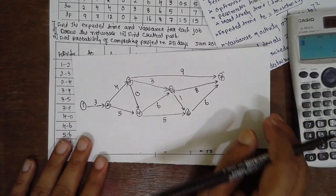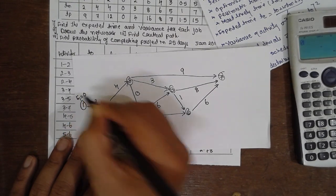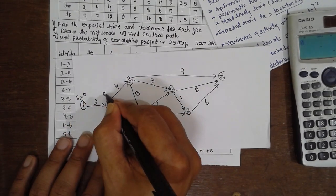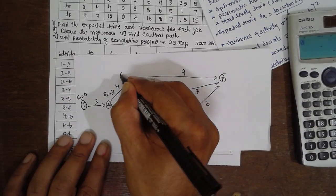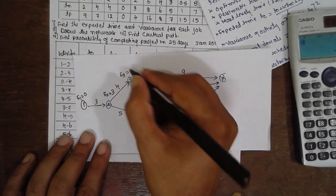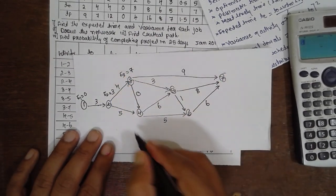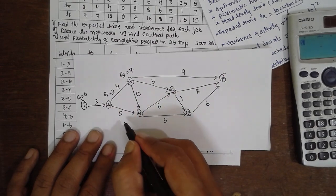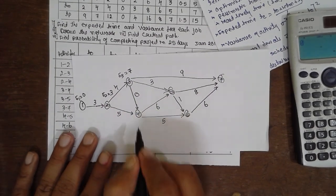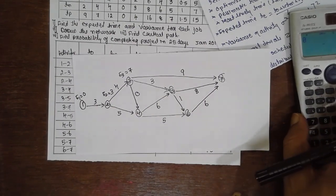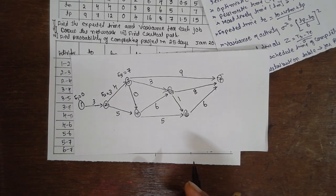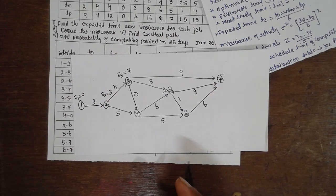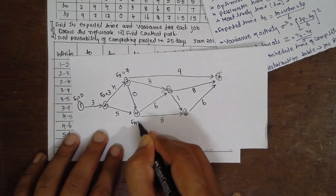Now we are finding the earliest times. E1 equals 0. E2 equals 0 plus 3, which is 3. Move here. There is a junction. E3 equals 3 plus 4, which is 7. Again, 3 plus 5 is 8. 3 plus 5 is 8. Both are 8. Then you have to select the larger value here. Select the larger value. E4 equals 8 here.